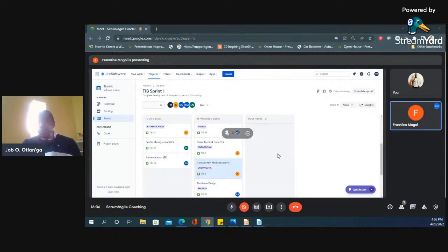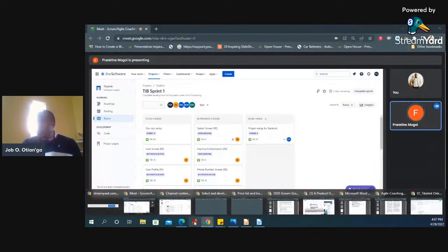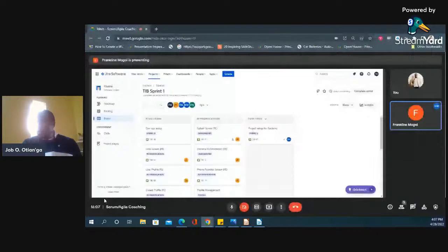The only thing that I think should be added on this board is that before stuff is marked done, it goes through QA. So only after QA is when we can say that, let's say, for number, QA has been done, and it's meeting the acceptance criteria, and then now it's done. Not necessarily per se. So who's the QA? Do you have a QA in the team?